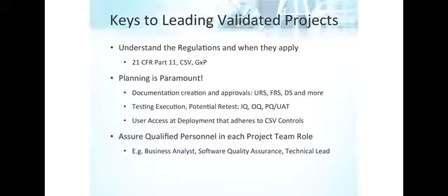Planning is paramount, as is documentation creation and approvals, as we just saw on that previous slide with the sheer number of documents that are needed, and Ron mentioned he had 50 on one project. Each of those documents has its own life cycle. So in my schedule, as a rule of thumb, I usually schedule at least a week to draft a document, at least a week to review it, and at least a week to approve it. So just imagine that's 3 weeks in the schedule for one document. And that could go infinitely longer if it was a bigger document and had more granularity.